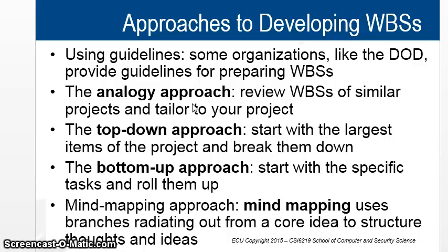Just like the one before, we saw that there's concept, planning, design. So this is the largest item, concept, planning, design, and then each part is broken into smaller ones. The bottom-up approach starts with the specific tasks and rolls up. So we start with, okay, you know what, plugin is important. Now plugin should go under execution. We need a user-oriented designer. Okay, user-oriented designer comes under concept. That is one of the ways.